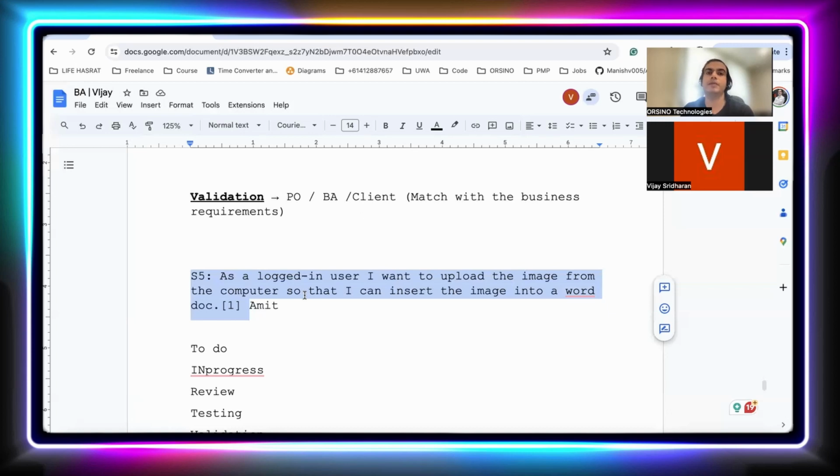But now what will happen? So let's say if it was a consultancy project, you need to tell them, this is the agreement we have discussed. We have already spent 2 weeks of time. If you want these additional features, if you want the way now which you are saying, there will be additional cost for that, because we need to allocate additional effort on that, right? So you can't serve everything at the same price which you requested. If you need the additional toppings, you need to pay additional money on that. Got it. Makes sense.